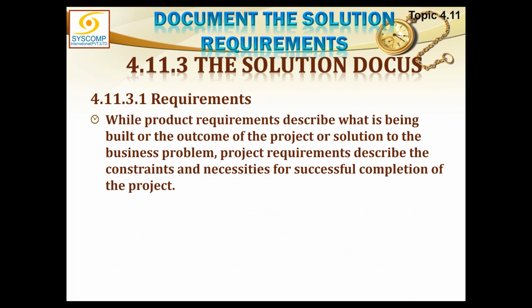While product requirements describe what is being built or the outcome of the project or solution to the business problem, project requirements describe the constraints and necessities for successful completion of the project. You remember, we said that the product requirements are the responsibility of the business analyst, and the project requirements, what are the project requirements? The work we need to do. The project requirements are the responsibility of the project manager.